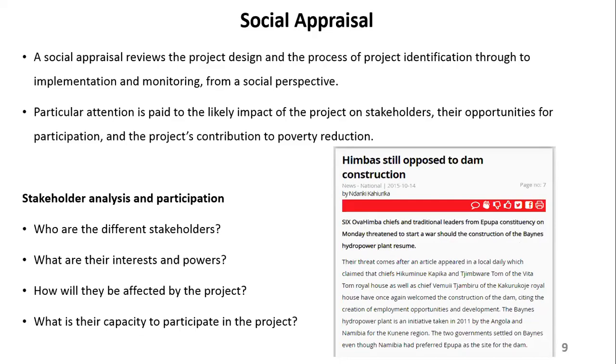Imagine now, these people have started already, they are in the middle of the project. But because during your identification phase, you completely ignored or did not consider social appraisal, you will find yourself in this situation. By now, let's say you have spent your money already. You have hired equipment, you have brought all the equipment on site, brought a lot of different people to site. You need to pay them, but the project will not go ahead. I think this project was stopped. That's another problem again. So you need to consider it,